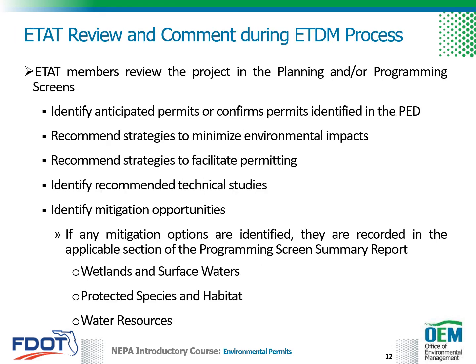ETAT reviews help to identify anticipated permits or confirm permits identified in the PED, recommend strategies to minimize environmental impacts, recommend strategies to facilitate permitting, identify recommended technical studies, and identify mitigation opportunities. If any mitigation options are identified, including wetlands and surface waters, wildlife and habitat, and water resources, they are recorded in the applicable section of the programming screen summary report. Overall, this process provides a basis for the level of environmental analysis and coordination needed during the PD&E study.